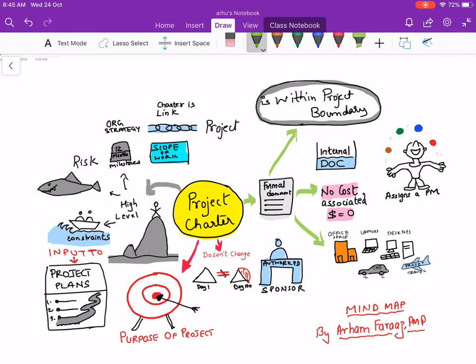Let's get started. First, a project charter is a formal document because it authorizes the initiation of the project. The project charter is an internal document. When you create a project charter, always remember there is no cost associated with creating it — there is no dollar value.